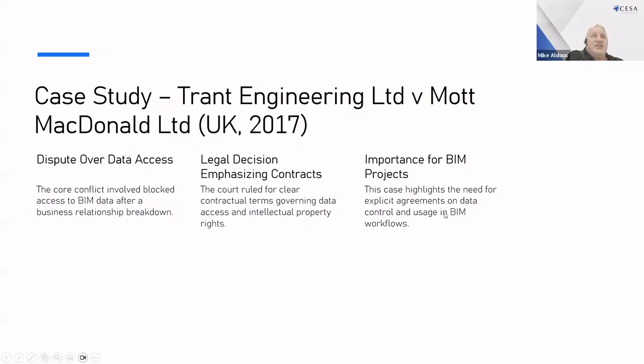The legal decision emphasized contracts: the court ruled for clear contractual terms governing data access and intellectual property rights. This case really shone the light on how critical it is to be able to show in very clear contractual terms, to non-BIM aligned parties standing in court, what the contractual relationships and obligations were between parties.